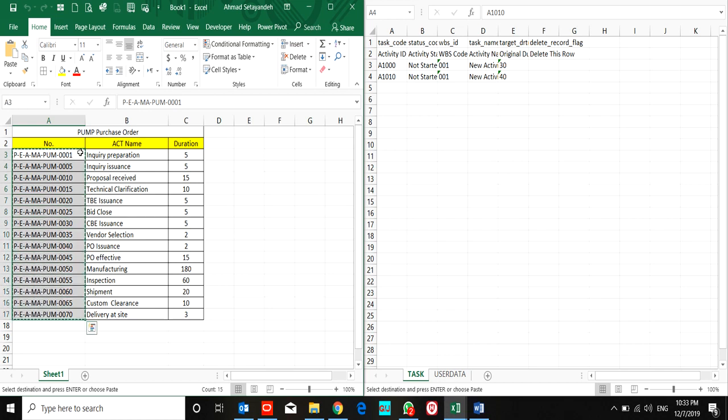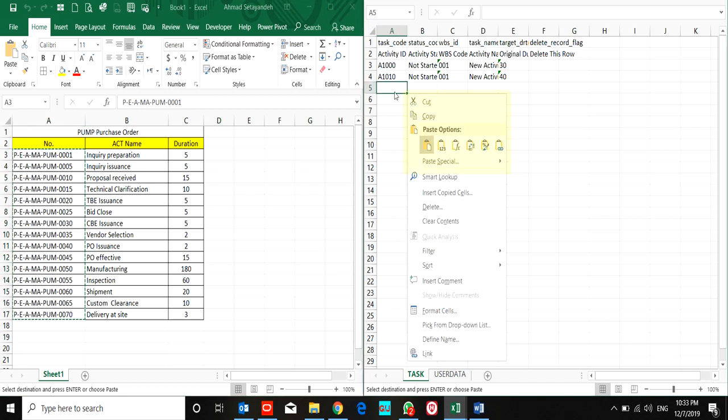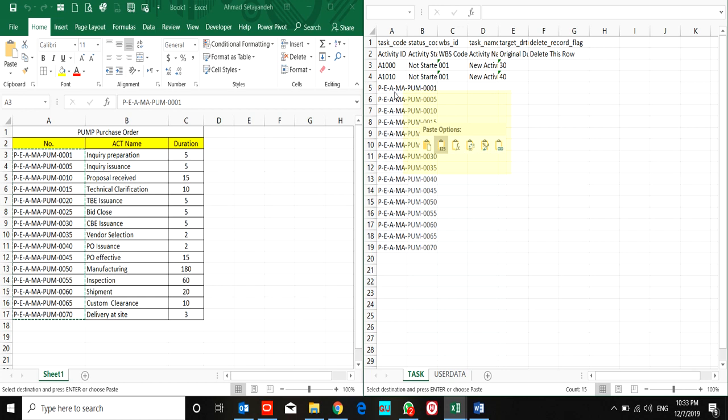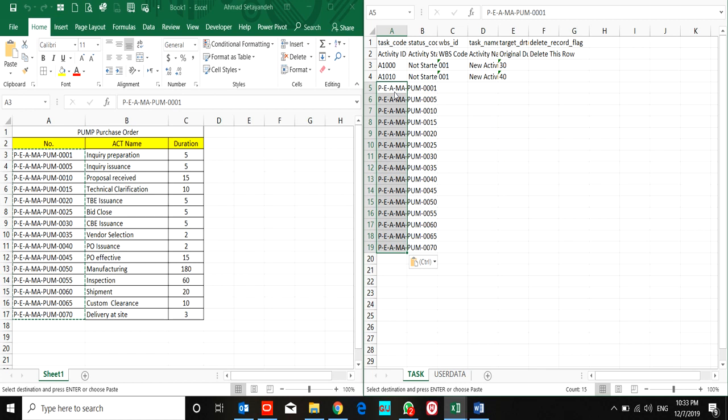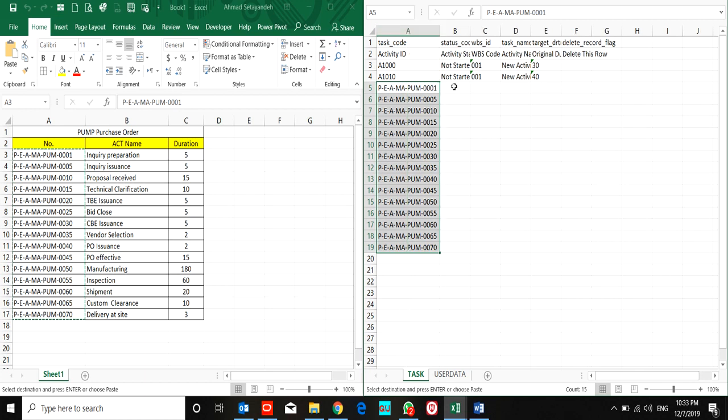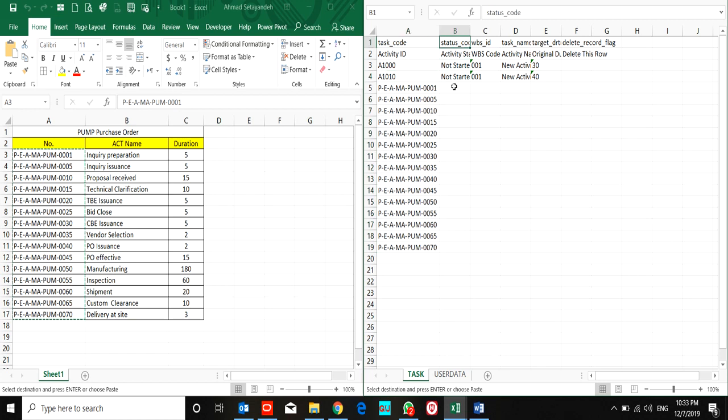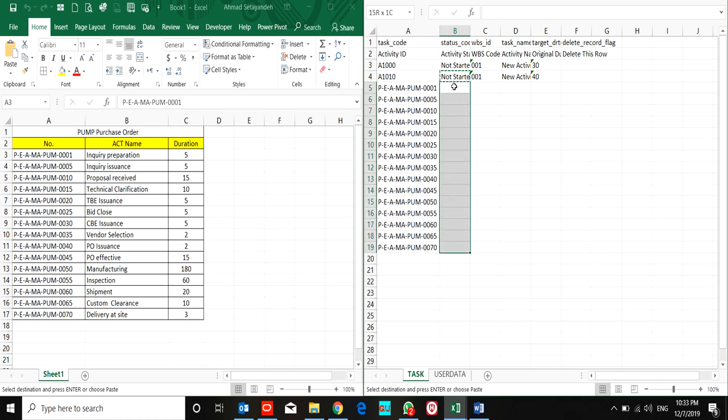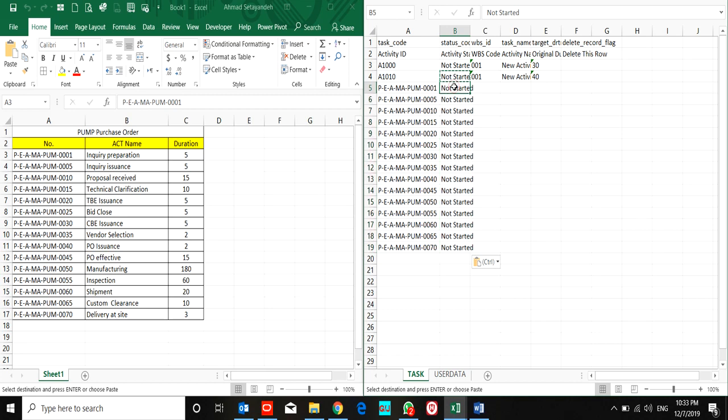I use only paste value in order to avoid any changes in this sheet, because I might face P6 errors during the import process. For the activity status, I copy and paste 'not started.'